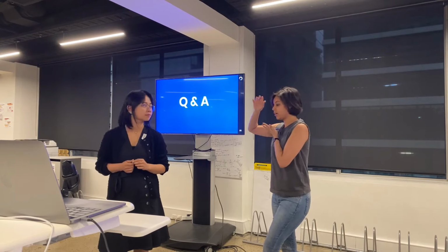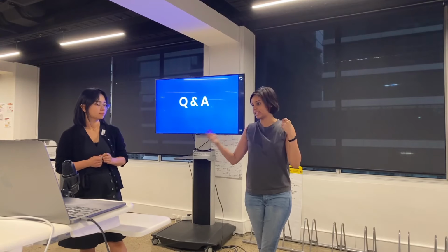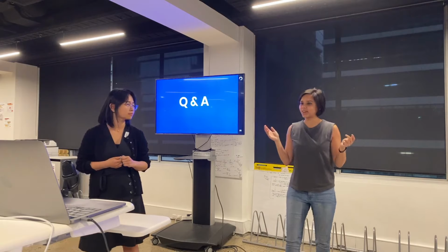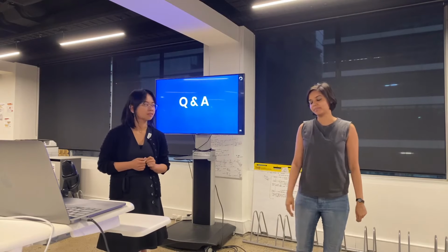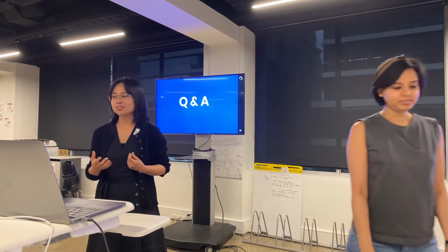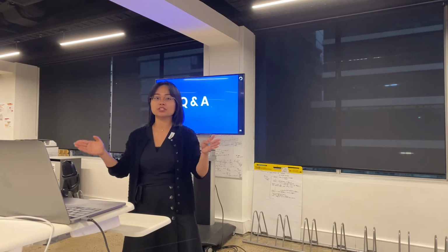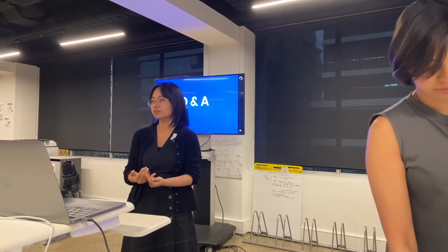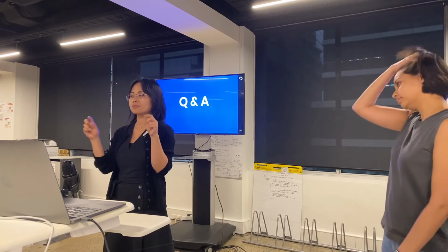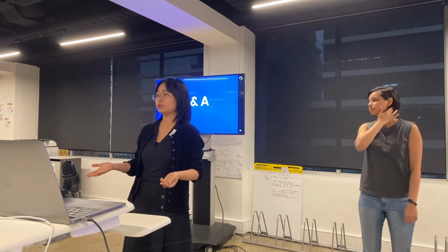In one delivery where there were already process maps defined, I looked at them as documentation, and then went back to my stakeholders and said, just for my sake, can we do this user journey? And I created user journeys at that time. For me, I use story mapping for everything. So if I get a process map, I will see how many features there are. If I can define one feature, I will user story map that particular feature. It can be the user journeys, maybe not epics, just high-level stories, and then you drill down to user stories. So it depends how you use it.